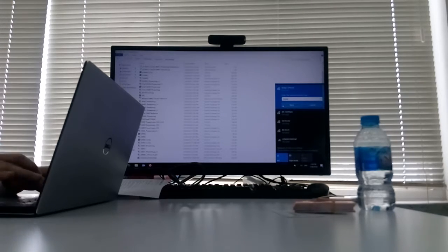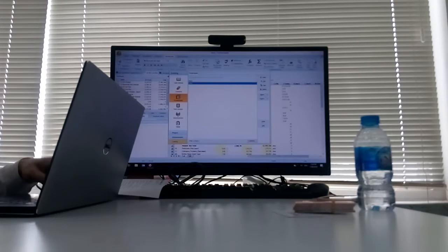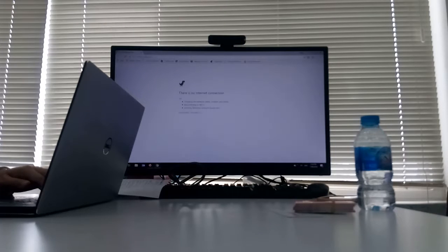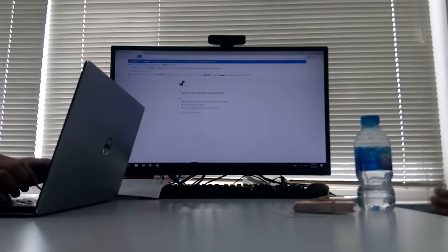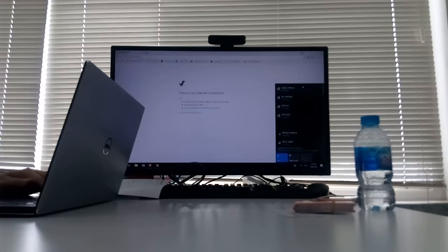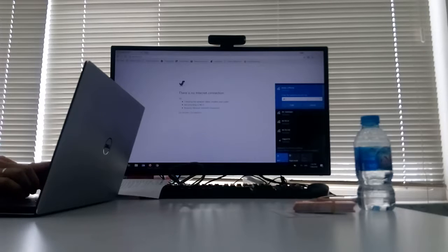They were adding a rate to it, and the cost for pricing under SMM7 was more than POMI. It was only because they had a line item they didn't know what it was, and they put a rate against it. So we've historically found that POMI is a simple BQ format that they understand, and it's easier for them to price. It's more in line with contractors' thinking than maybe a surveyor's thinking.